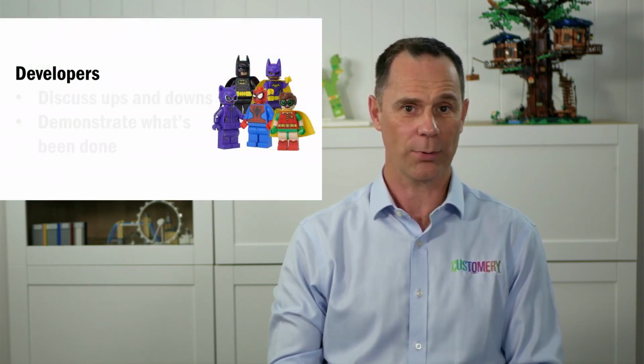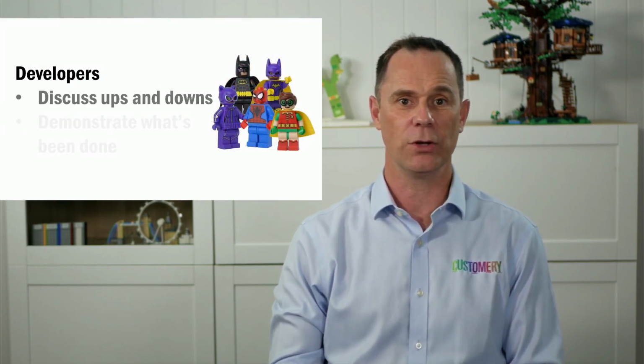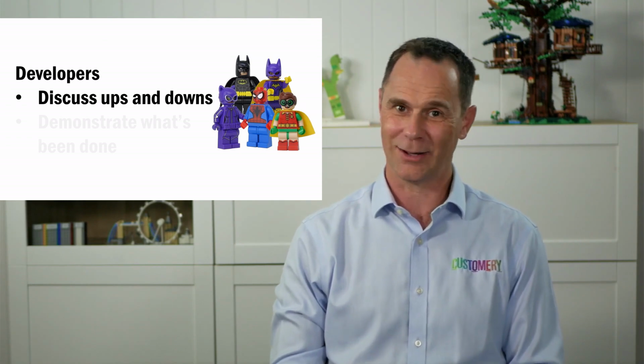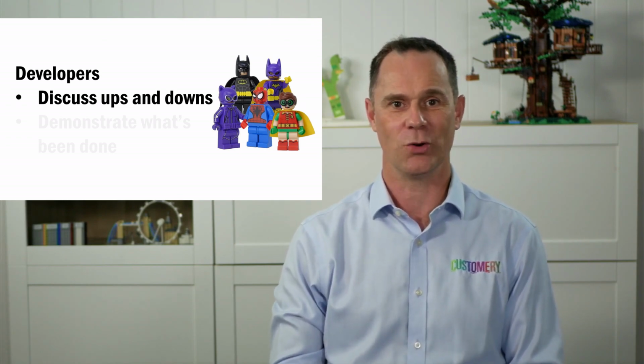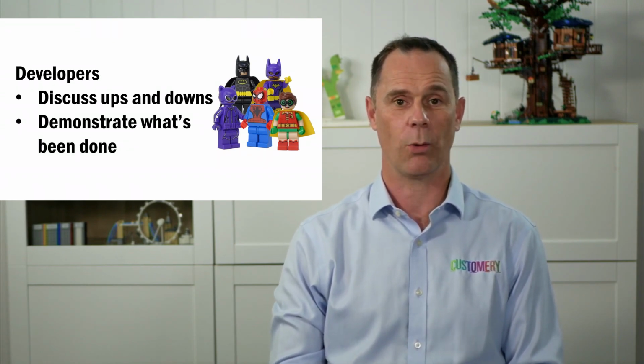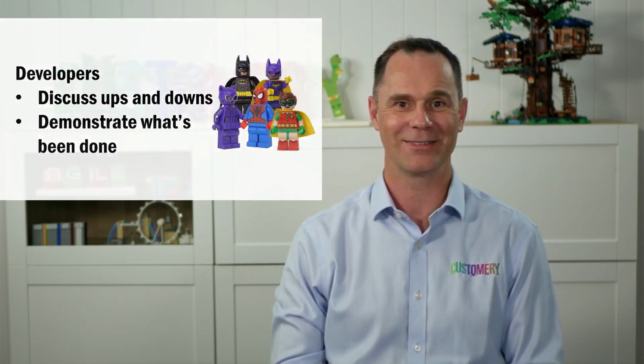The role of the developers in the sprint review is to review what went well, what didn't go well, and how they responded during the sprint. They demonstrate what work has been done and answer any questions anyone has about the new increments.